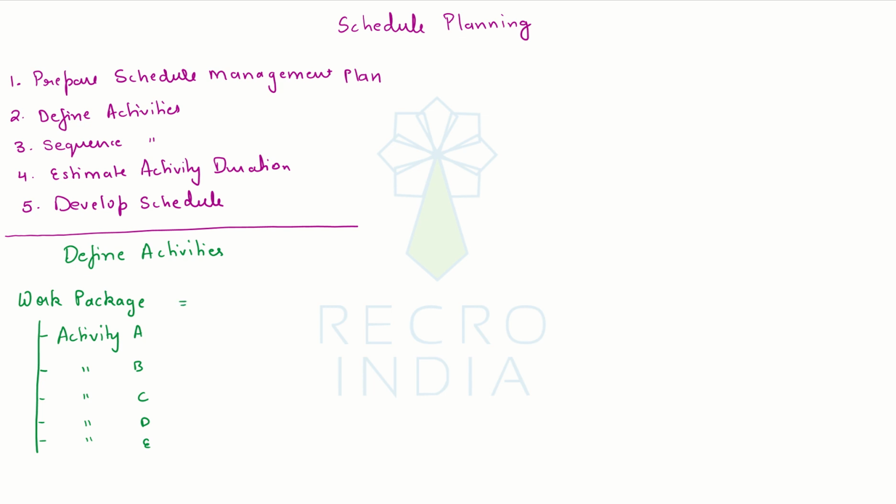So say for example, we have a work package, let's say, paint a room. Now what will be the activities? Maybe let's suppose, select the color, then move the furniture out, then clean the walls,